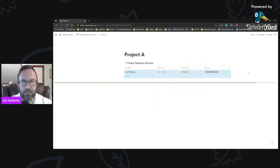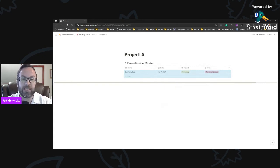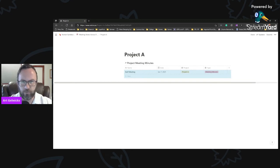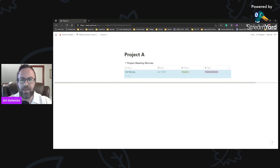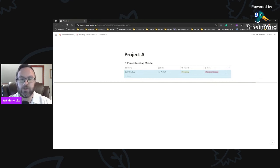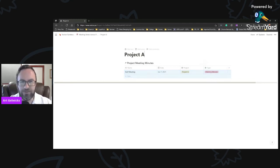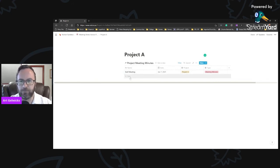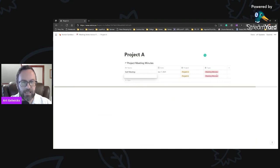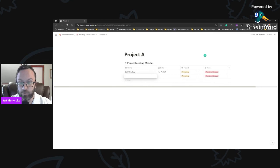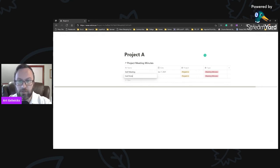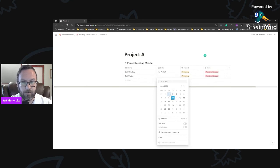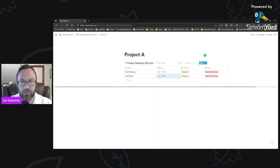Now why would I do that? I mean I'm only putting meeting minutes into this listing. But again, this is why I'm future-proofing this particular capability. If I wanted to have maybe project charters, maybe approval documents, whatever else I wanted to include in there, that categorization would allow me on this project page to put in additional linked tables and be able to filter down to those other sets to really help me organize. But that's not even the reason why I did it. I did it because of this neat little feature. If I'm looking at project A's page and I go and I add another meeting set of meeting minutes here, look what it's already done for me. It's already populated the project and the type columns because those are the filter criteria that I have applied.